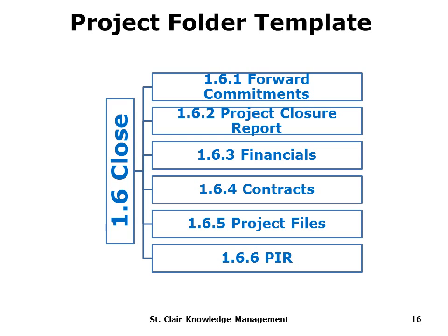Your project closure report. So this is where you're effectively producing a summary of the project, where you're looking at lessons learned, what went well, what didn't go well, and this is really, on the approval of this document within this folder, the project is deemed completed.